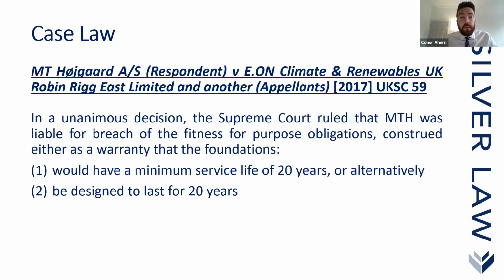Another case in this area was the case of MT Hogarth versus Eon Climate and Renewables UK, which is back in 2017, which is actually a Supreme Court case. So in a unanimous decision here, the Supreme Court ruled that MT Hogarth was liable for breach of the fitness for purpose obligations, which are construed either as a warranty that the foundations would have a minimum service life of 20 years, or alternatively be designed to last for 20 years.